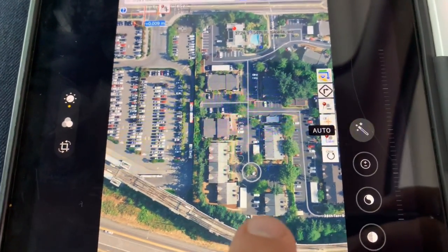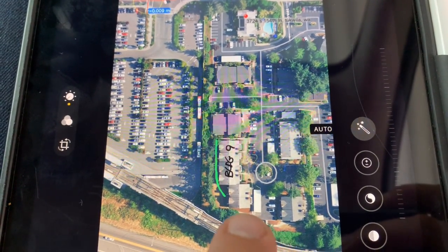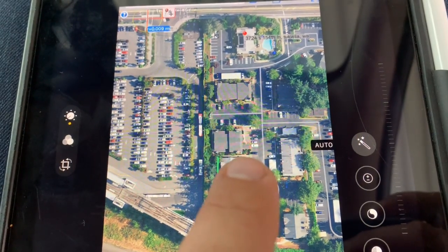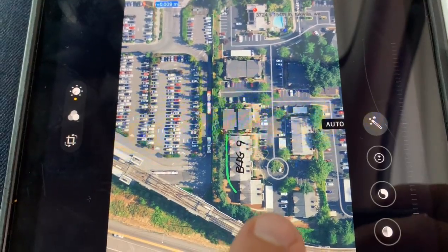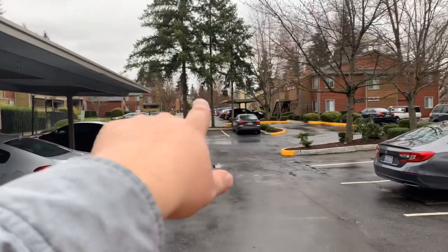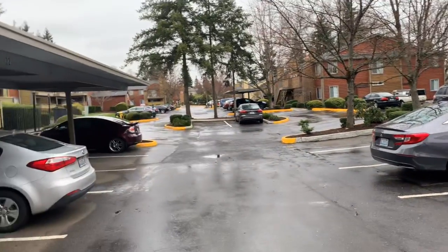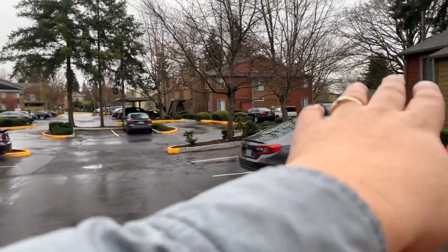Project managers will probably have to block down here, this area, for the truck when we run the line pump this way. Then we'll probably have to come up here, block off another 4 or 5 stalls in order to get up the staircase and then up this area. This is the easiest access from the south side. Okay, so that's where I was showing you the north end. You come all the way back. If we have big trucks, project managers, we can turn all the way around and go around those trees and right back out that way.